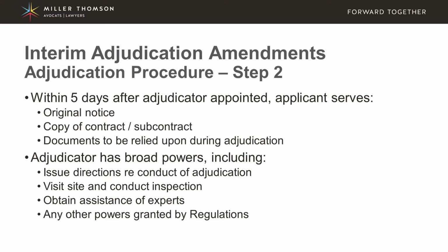It's important to note that the adjudicator has very broad powers. They can issue directions with respect to the conduct of the adjudication, so there is some flexibility there, and it's at the determination of the adjudicator. The adjudicator can also visit the actual project site and conduct its own inspections. The adjudicator can also seek the assistance of experts, and the adjudicator will have any other powers that will be granted to it under the regulations.